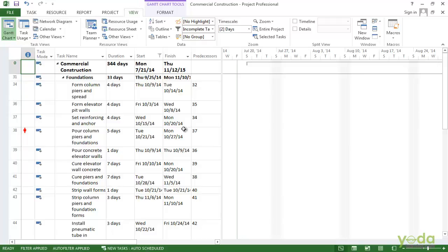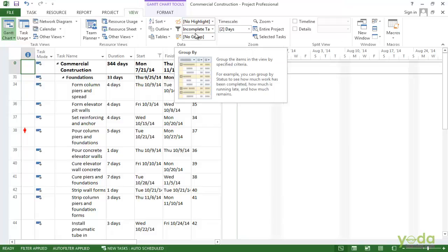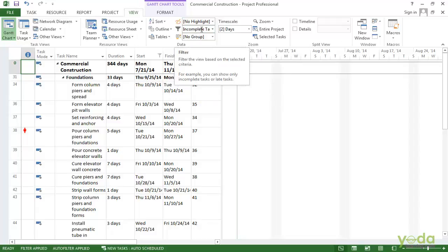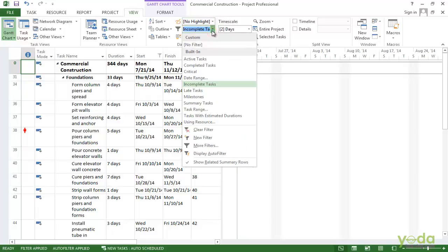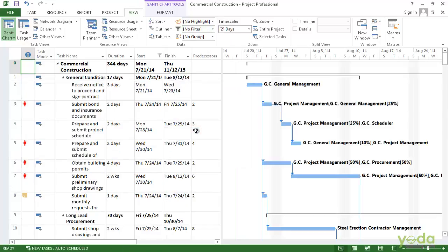Now when I do that, you can see that the things are filtered because we have this little funnel here up in the column heading. Also, the status bar says AutoFilter applied because I have also got a filter up here in the filter box. If I want to remove a filter, I can click the filter icon here and say Clear Filter from Start, and the funnel goes away, and so does the filter.